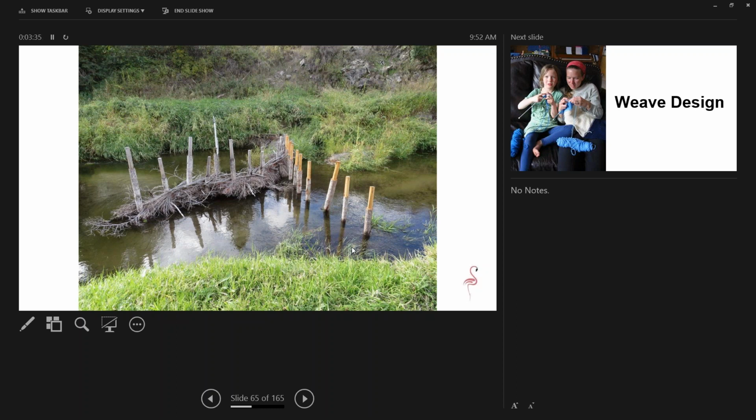Desired outcome, so you start building them downstream before coming. Yeah. I like to observe as we weave. I like to observe the hydrologic effects before weaving the next one, because they do start to function immediately. That's a good point. It really is helpful to start downstream and work your way upstream. When we're post-pounding, we just post-pound downstream to upstream, the whole thing, so that we can get that done and out of the way. We've rented equipment. We're in post-pounding mode. But then with the weaving, that's where you really start to observe the effects as you go.